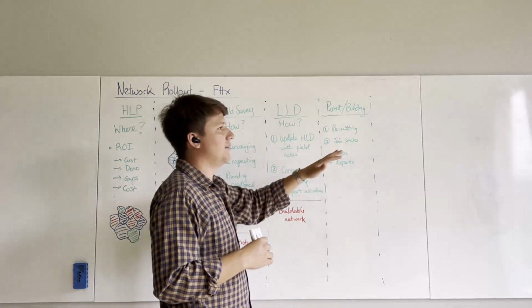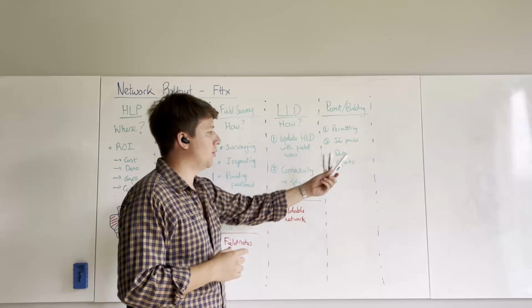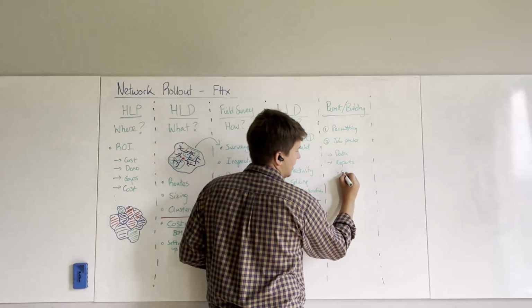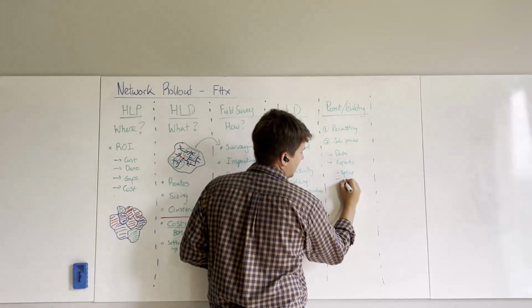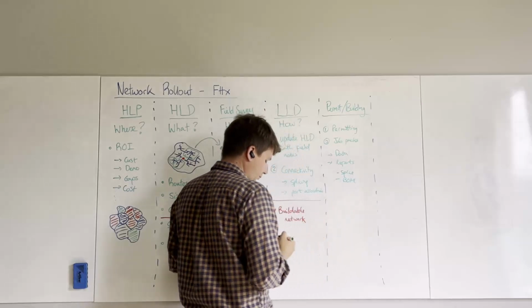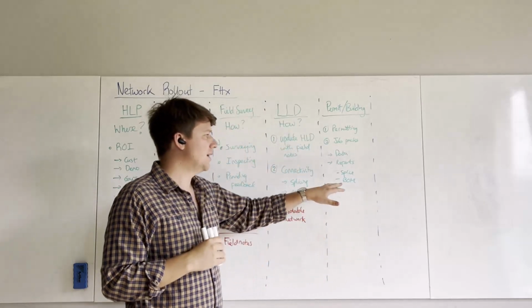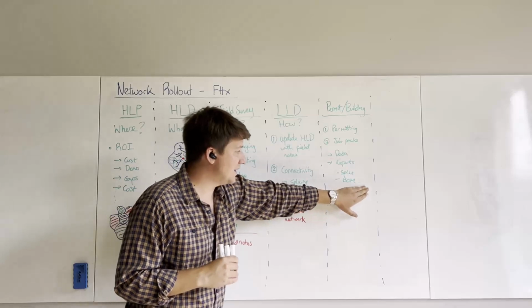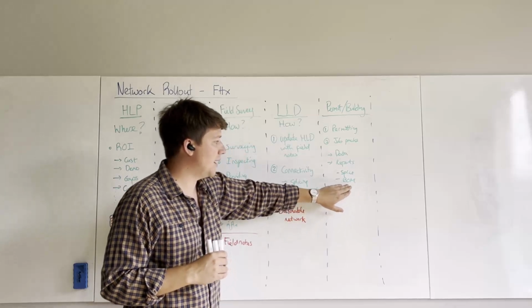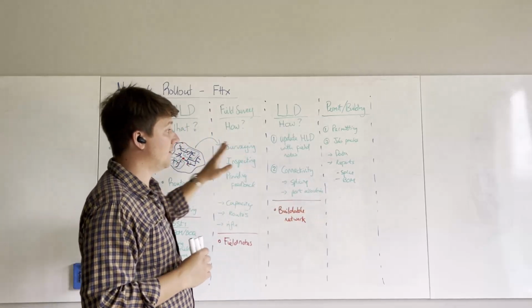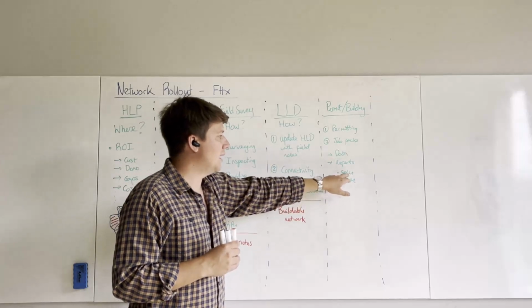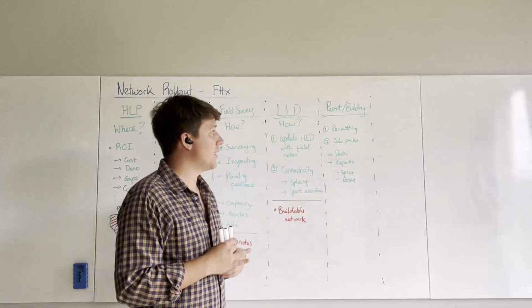Job packs, this is giving out to the construction teams, this is reports like splice sheets and bill of materials, etc. So that they can actually go out, take the correct assets, the correct hardware out into the field to build the thing in the first place, and then also how they're going to connect it all together.